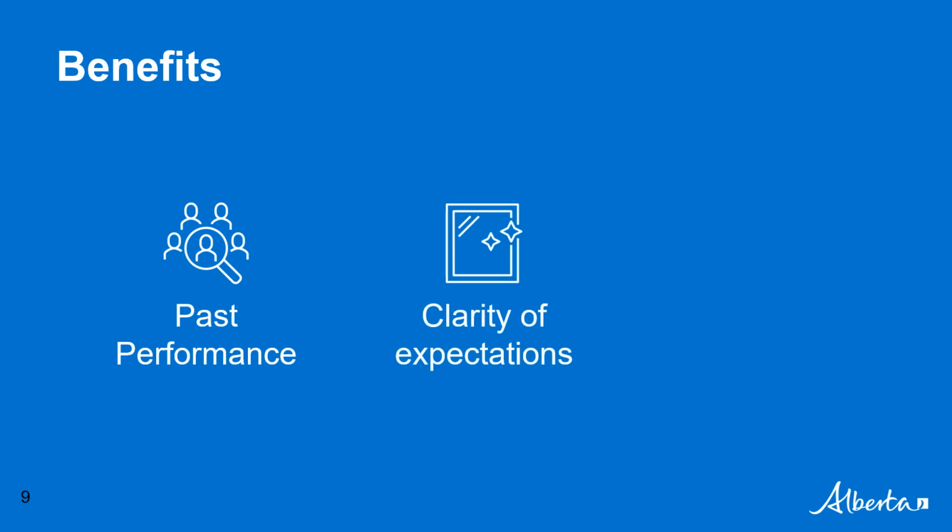Additional benefits include vendor past performance is taken into consideration during procurement evaluations. VPM plays an important role in setting clear expectations for vendors by establishing measurable criteria and five key indices: safety, quality, cost, schedule, and management. For even further transparency of these expectations, Infrastructure includes VPM documents such as evaluation forms in the procurement package and contract, ensuring that the expectations are clearly laid out to vendors.